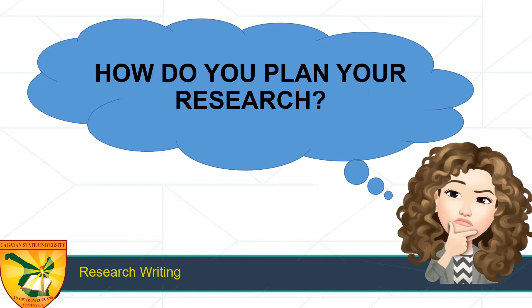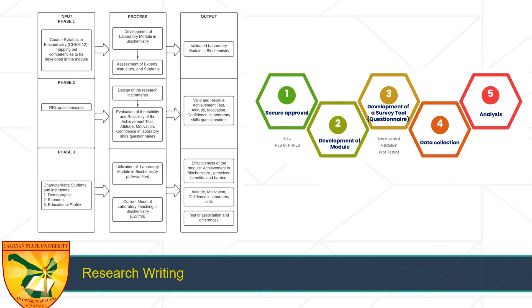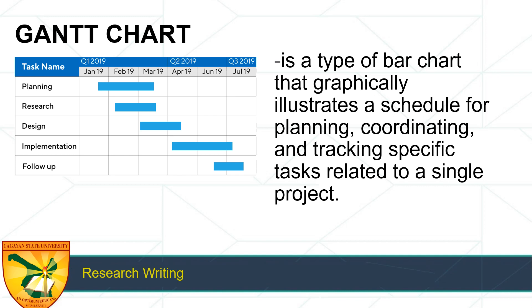So how do you plan your research? After you're done with chapters 1, 2, and 3, what's next? You need to go back to your conceptual framework and data gathering procedure. The activities and the flow are all there; what you just need to add is when you will do it. That's when this tool comes in — our Gantt chart. The Gantt chart is a type of bar chart that graphically illustrates a schedule for planning, coordinating, and tracking specific tasks related to a single project.